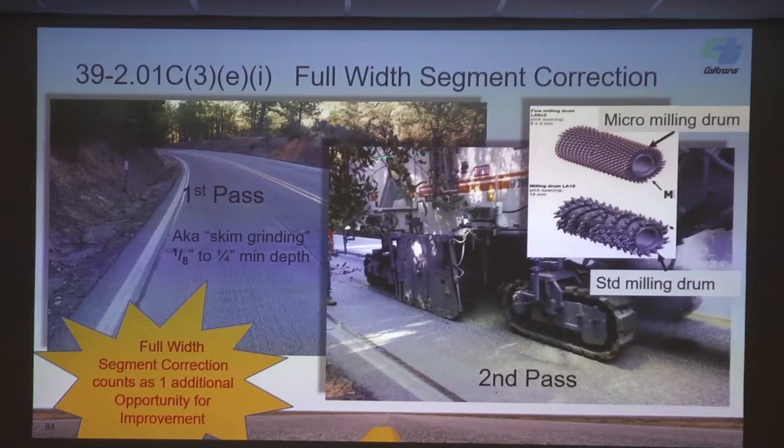And this is the end result spec too, right? We're going to go off the existing. It's to their benefit to control this thing to make it as smooth as possible, so that when they go pave it, it's going to be easier to get a smoother pavement. Now, the paving crew's going to come through, they might mess all that up, make it worse, right? Yep. They have to use best paving practices.